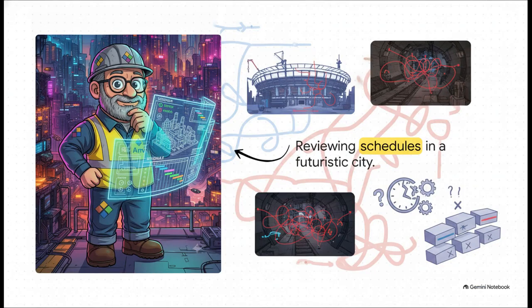Look, we have to acknowledge a universal industry problem right out of the gate. Planners everywhere use the word lag for absolutely everything. A delay? That's a lag. An overlap? That's a lag too. In day-to-day conversation, that might seem harmless enough, but in proper schedule logic, forensic review, and governance, it is creating massive confusion. Lead and lag are not the same thing, and mixing them up can completely compromise your schedule's integrity.